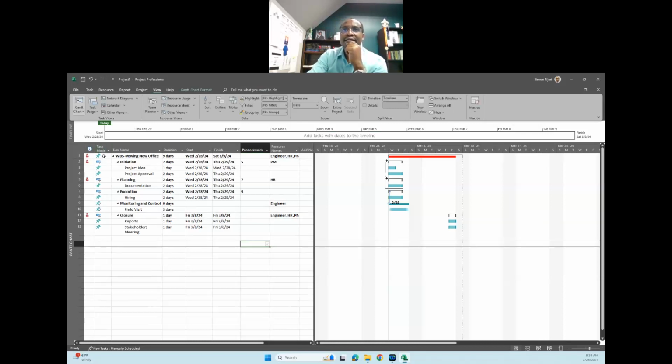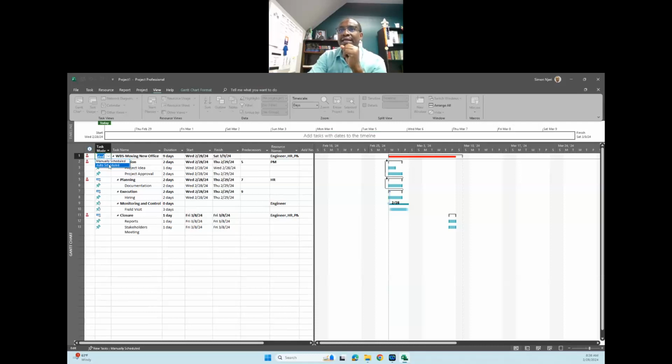The other thing is about these tasks. If you pick them, you see they are showing us they've been manually inserted. So we want them to be automatically scheduled. If I click auto, something changes on this other side. Some coloration takes place. You see there was color green, but once I click auto, the color changes. So we want to make sure that everything is on auto mode.